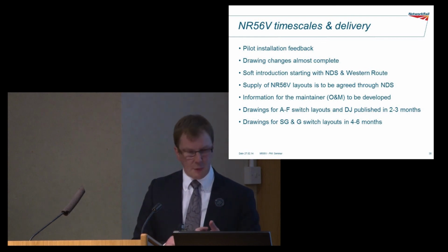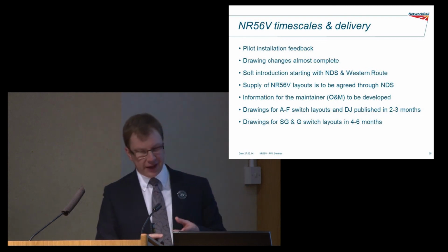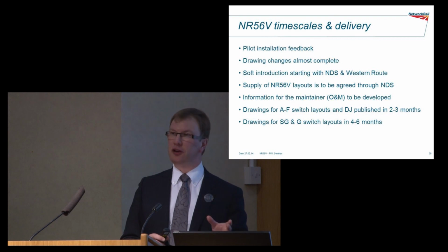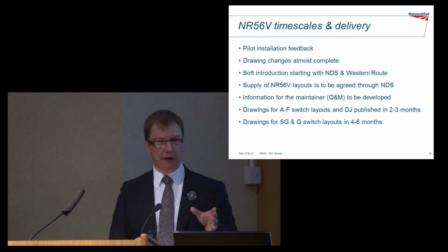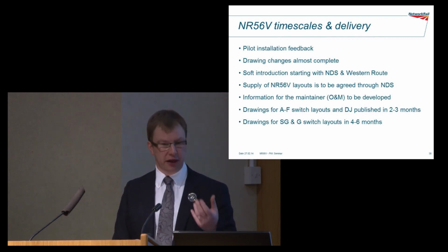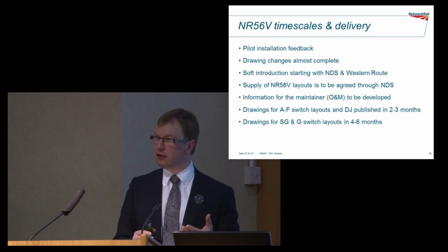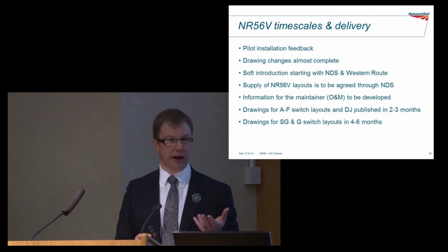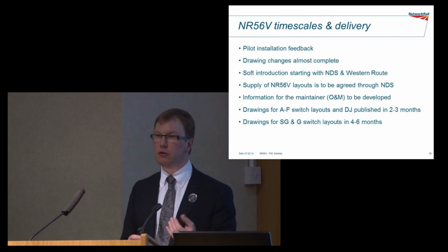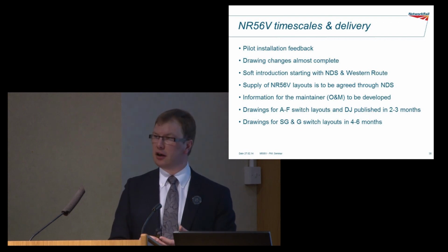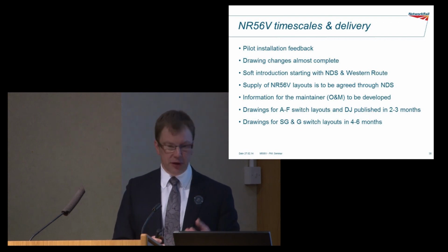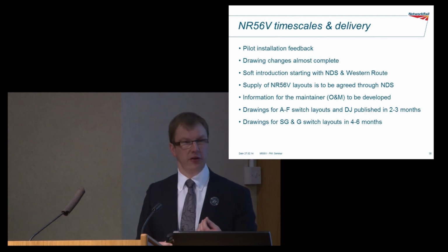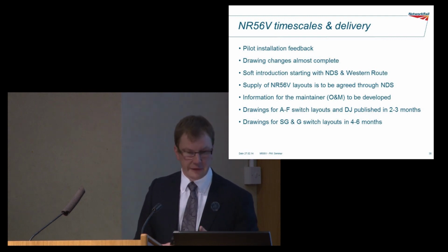I have to say it here, and it is a thing. Any layouts that people want to do in NR56V, we have to agree that through NDS, and this is really to make sure that all the contractual arrangements are in place and that the manufacturer's ready. There are different tools required, so there are tooling lead times and different components that need to be ordered, so it's important that all of that detail is agreed through NDS.